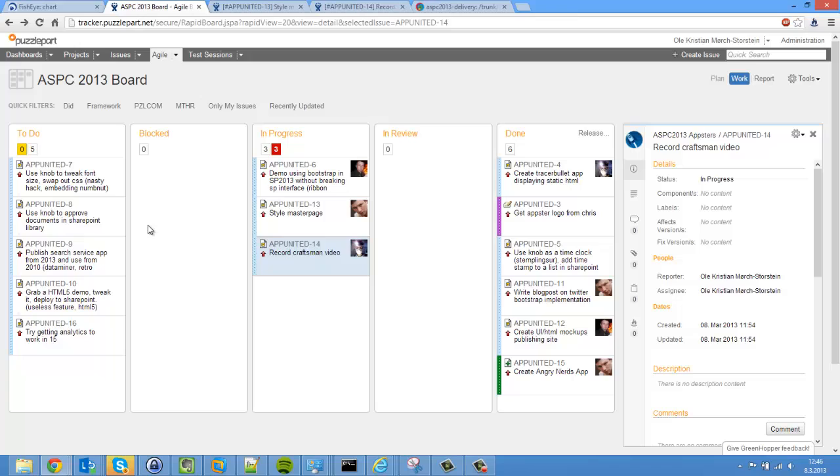For tasks, we're using Atlassian Jira. This is a Kanban board that has been configured to show all tasks for this particular project. And what we're doing is continuously moving things over to in progress. And as you can see, we have a constraint on the amount of tasks that are in progress at any one time. And since we're 3 people on the project, we can only have 3 tasks in progress before one has to be moved back to the to-do column, or we have to resolve it either by saying that it is complete, or we won't fix it and moving it over to done.